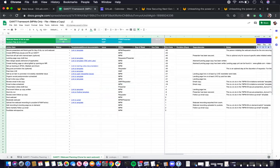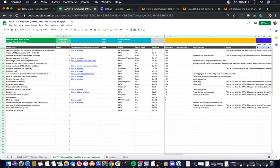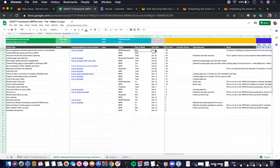Say it's 12th of December 2019, that it should auto populate the day of the week. When the specific task is due, the due date of when the task is due. And all this is auto calculated based on the SLA column here, column H.